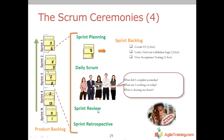Immediately after the sprint review we have our retrospective — talking about what's working well and what needs to be improved. If you wait until the end of the project for a post-mortem, it's too late to fix anything. This is where the team openly and honestly discusses: team dynamics, communication issues, product owner engagement, requirement quality, environment issues — any impediments. How can we do this better next sprint? That's really the heart of agile: continuous, predictable process of planning, daily visibility, showing work, and improving.